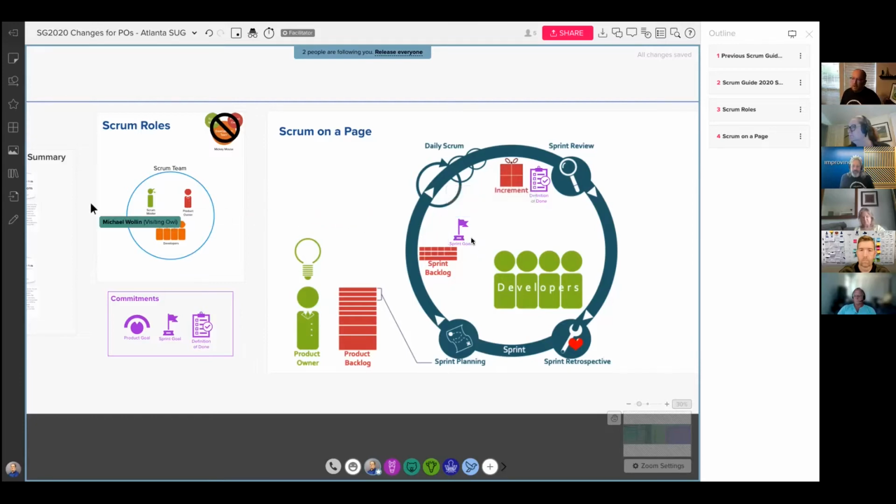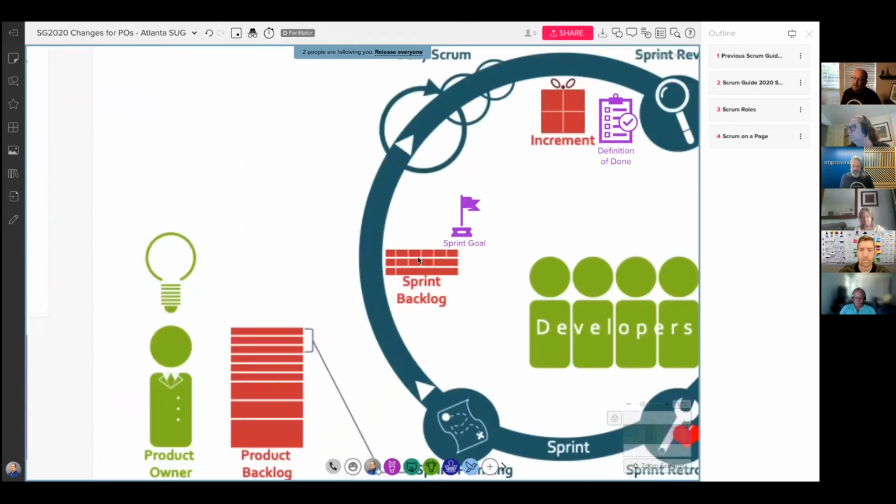But instead, what a lot of people would say is you would forecast how many things you can take on in the sprint backlog, borrowing a word from other empirical industries, yet commit to the sprint goal. So we will commit to the sprint goal. Like, this is the next hill we're going to take in the battle. So it made sense to use the word commitment there too. It is the real objective of the sprint backlog. So even though you don't get every single block done in this thing, as long as you can achieve this, we're good, right?